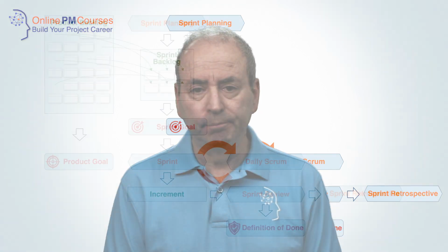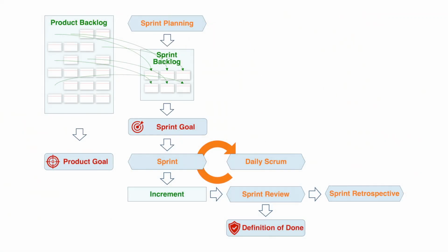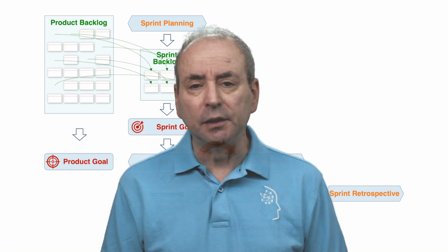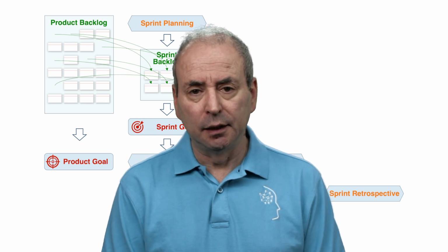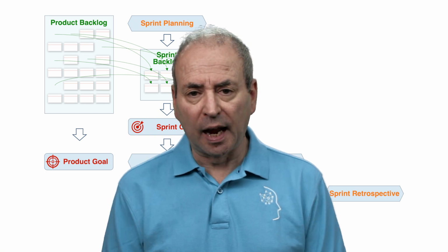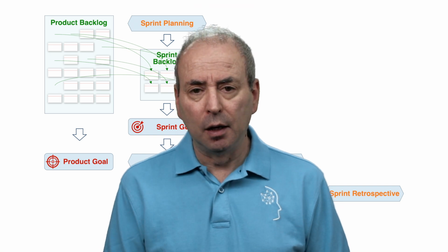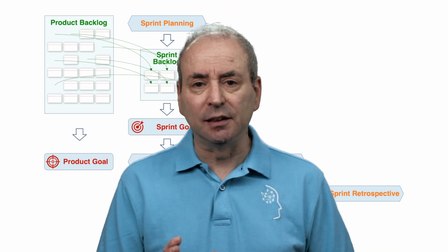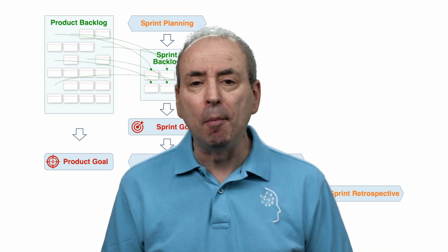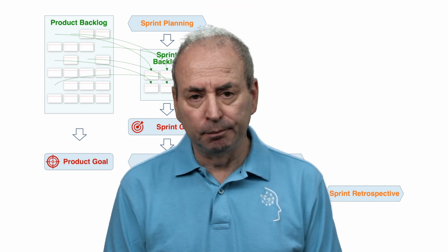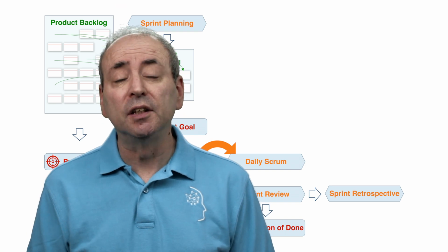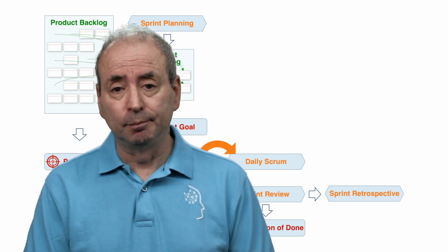They use it to consider the ways that they can work together even more effectively and even more efficiently in the next sprint. The discussion needs to include things like team dynamics, individual performance, development and management processes, the tools and methods that they use, and critically, they need to work to an outcome where they have a set of tangible actions that they can take to improve their process in the next sprint. Typically, sprint retrospectives are time-boxed at around an hour.